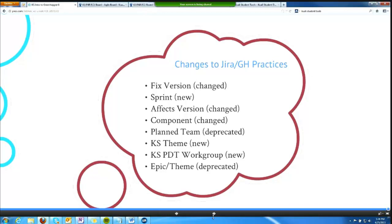So if the product owners and I are reviewing the backlog and we see a particular ticket, we might say this should be worked on in M7, or we should work on this in M8, and we'll assign a fixed version as a result of that decision. I've begun working with the product owners to document some prioritization practices about what is okay for the team to pull into the milestone after milestone goals have been defined, what I'd expect consultation on, and what decisions I should be making as a product manager. More to come on that.